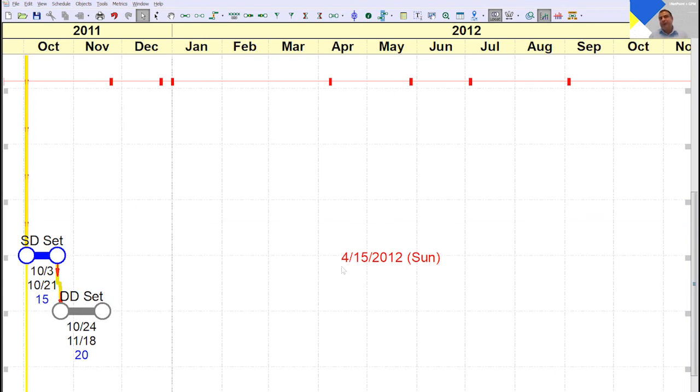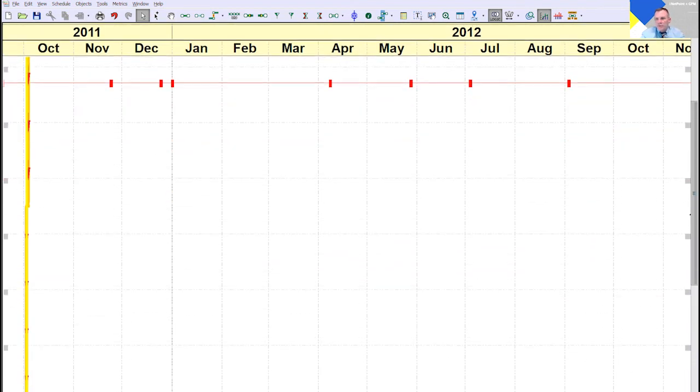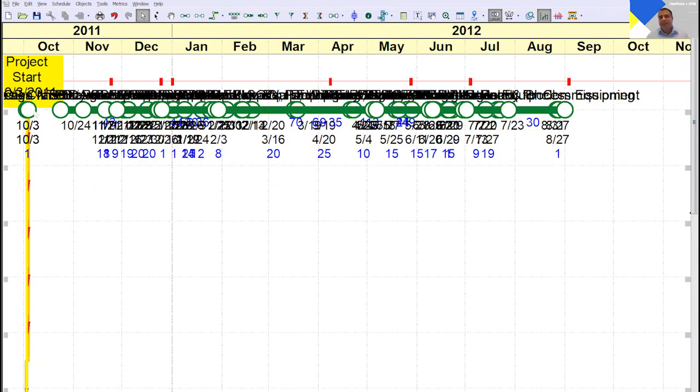At that point, your new activities do not have position information and will follow the same protocol. They will be laid on the top grid, so they are easily visible right on the import. These things probably need to be laid out at that point. And they would align to their start date, right? Yeah, they will be on their start date, but on the top grid, just like that.